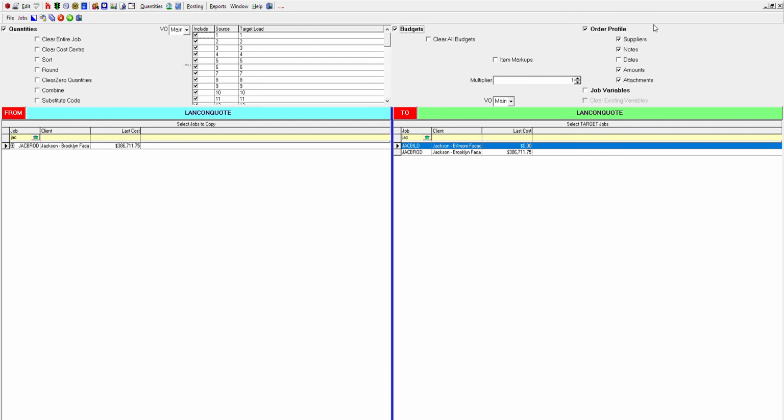So this relates to if someone's put in suppliers. If they've used a price and allocated a supplier, so they've put in a price for the frame, and said, as per quote from Bunnings, lower frame, floor system, upper frame and trusses, and the date of the quote, and then they've gone up to the top right hand corner and put in Bunnings as the supplier so that it's easy to issue out the order, it will copy that information across.